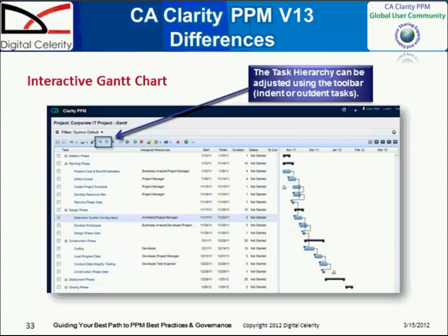And so it's going to set up the allocation based on that profile. A lot of times, as a practice, I would set it up as 0 allocation. That's just the practice I follow when I work with customers, so that someone has to put in allocation segments, but it will create them, yes.